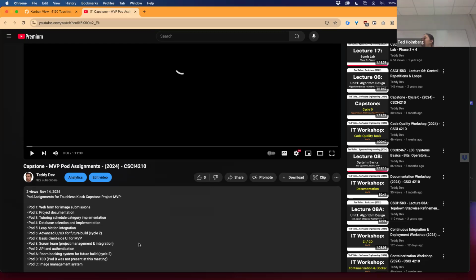Yeah, but the main priority will be the MVP build and what's next, right? We really want to prioritize stating clearly what the MVP is and the next steps. It's super critical for development that we get an MVP build done, in my opinion, by next week, because the week after next is Thanksgiving break. Once we get past Thanksgiving break, we roll right into the first week of December. So we want to at least try to get the MVP deployed so that we can add some of the mission critical features that go on top of that.